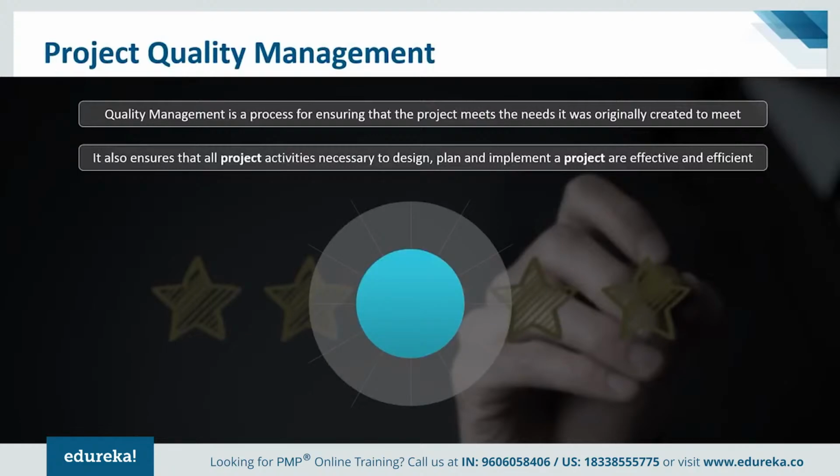There are a few things that we need to definitely make sure we are doing as a part of quality. One is, of course, verification. Continuous verification is what is expected by the team and the project manager. For example, a simple verification could be a traceability matrix. We ensure we have a traceability matrix on the project so that we verify the requirements that we have gathered from the customers. Are we incorporating those while doing designing, coding, testing, deploying, etc.? That simple verification really helps us. And it's not just backward traceability, but also forward traceability that we ensure we are doing. So that's a quick example of verification.